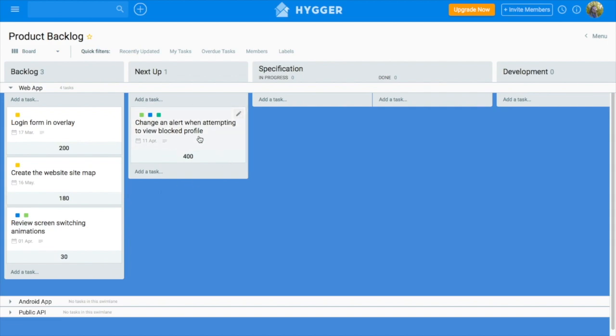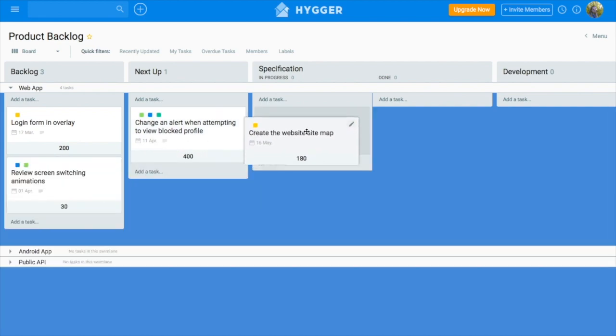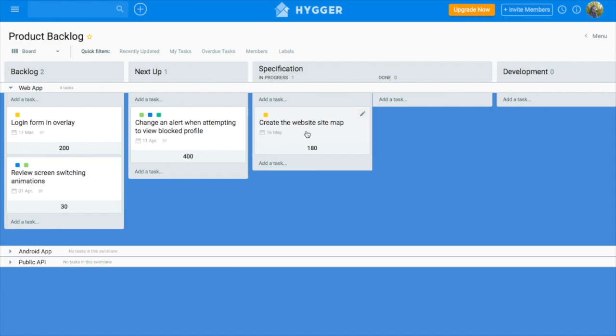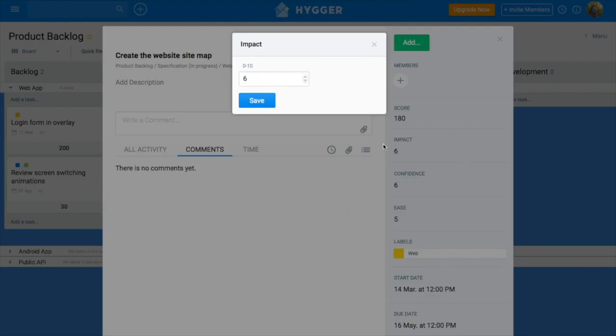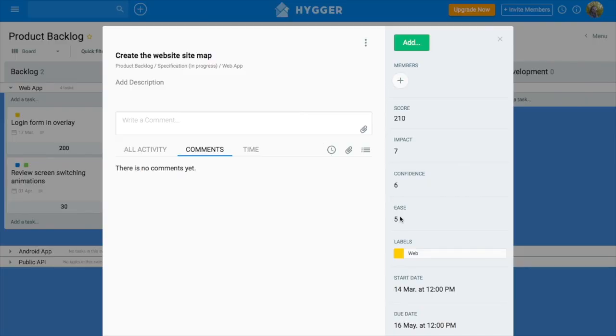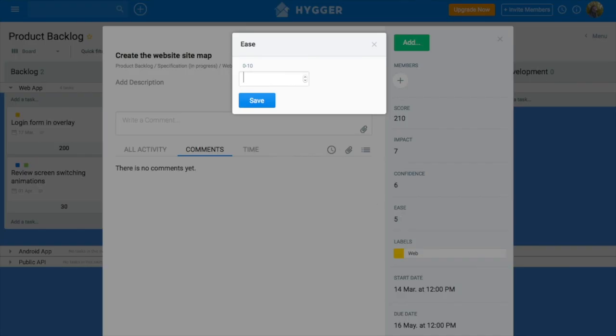When you start researching your ideas, talking to customers, analyzing competitors, and gathering requirements, you move a task to Specification column. You can also reprioritize features according to new feedback and knowledge you obtain during the feature's research.